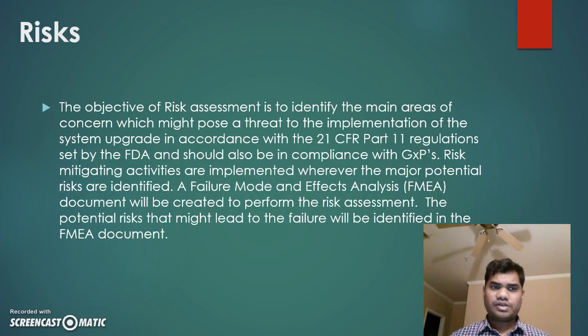When it comes to the risk assessment, we'll be conducting risk assessment so that no potential risks will harm this project later. And for this, we'll be drafting a FMEA document in which we will identify the potential risks, and we will try to mitigate the risks, so that the project can go live successfully.